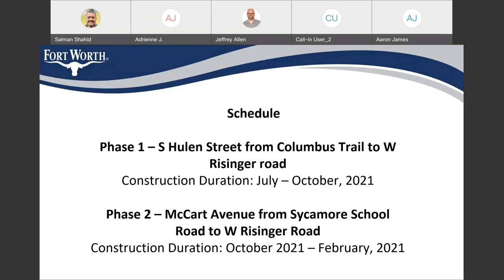We have basically two phases for this project. The first one is South Helen Street from Columbus Trail to West Risinger Road, and we are anticipating to start this phase first. We'll be working on South Helen Street from July 2021 all the way to October 2021. In the next phase, we'll be doing McCart Avenue from Sycamore School Road to the west road, and the schedule for that is anticipated from October 2021 all the way to February 2022.